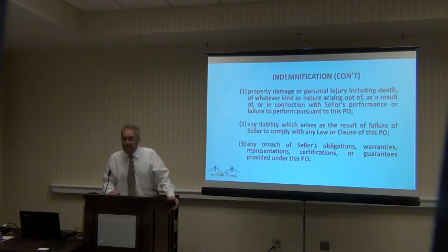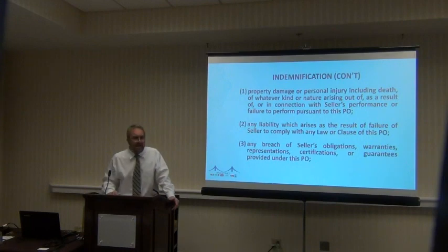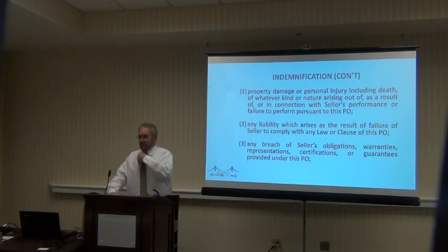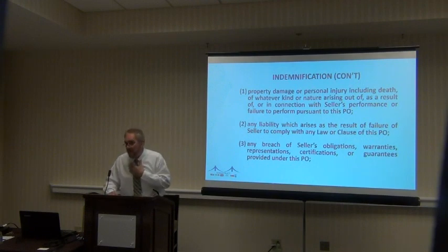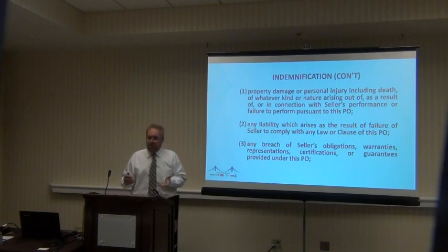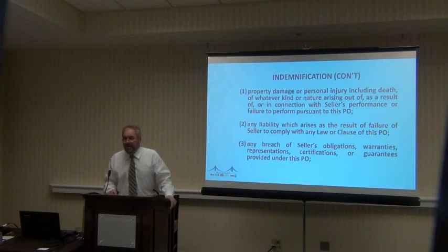So personal injury and property damage, that's covered by a CGL. What's wrong with that language then? Everything after, whatever kind. Well, number 1, it doesn't say to the extent caused by me, and it doesn't reference the other key thing. It doesn't reference the concept of negligent conduct. Insurance coverage is triggered by negligent conduct, careless conduct. It is not triggered by breach of contract conduct.